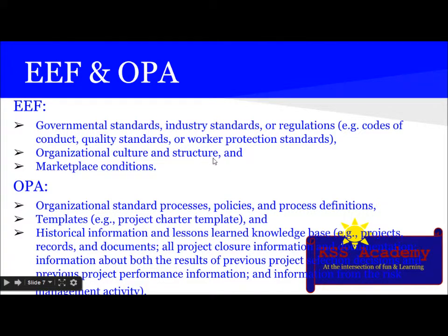Organizational culture and structure and marketplace condition. What is OPA? OPA is organizational process asset. It includes organizational standard processes, policies, and process definition, templates, example project charter template, and historical information, lesson learned, knowledge base, project records, documents, all other project closure information